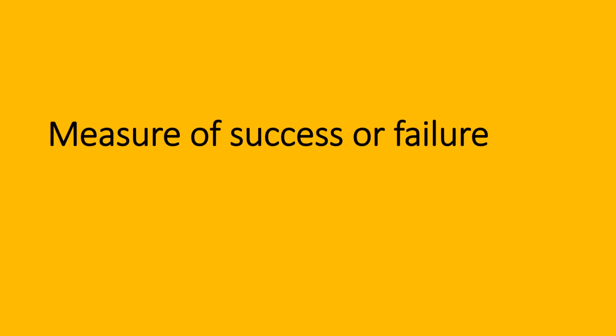So how can we measure the success or failure? A sprint should be considered as a time box in which to limit the scope of work that can be successfully completed. A sprint does not succeed or fail, it just ends. You bring work in according to your velocity and attempt to complete it within the sprint. If you don't complete all the work you bring in, then your velocity is reduced and you bring in less into future sprints.